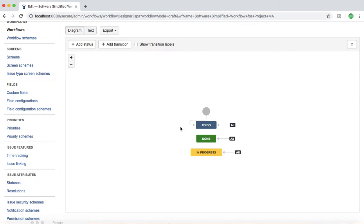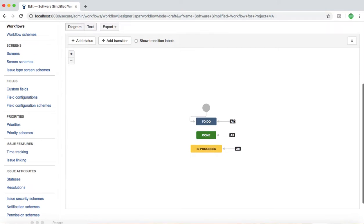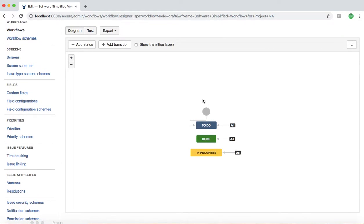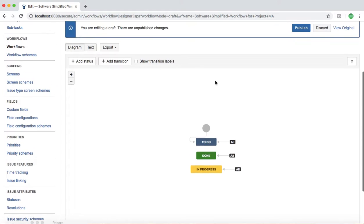You can transition an issue from To Do to In Progress, or from In Progress to To Do, or from In Progress to Done. That's why with global transitions, issues can transition from any state to any state. If you have specific transitions — for example from To Do to In Progress only — then issues can only be transitioned that way unless you have a backward transition enabled. At the moment there are global transitions in this simplified workflow.